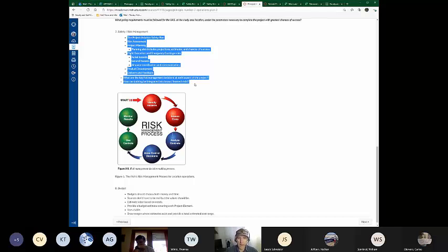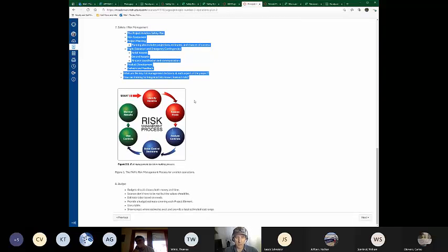Not only do you not want to chop your visual observer's finger off because it would be bad for that person, and maybe you like them or maybe you don't, but if you chop someone's finger off, you're done for the day. Your project is grounded for the day, at least, while you try to figure out, well, why did this happen? How do we avoid this happening in the future? So keep in mind, risk management is a very important element of operations and getting the operations completed successfully.